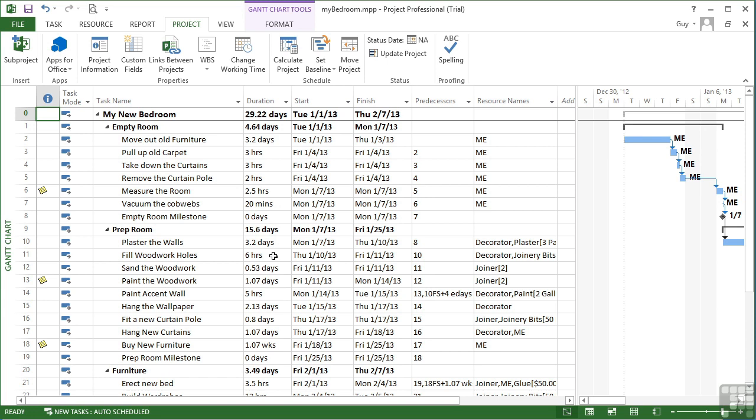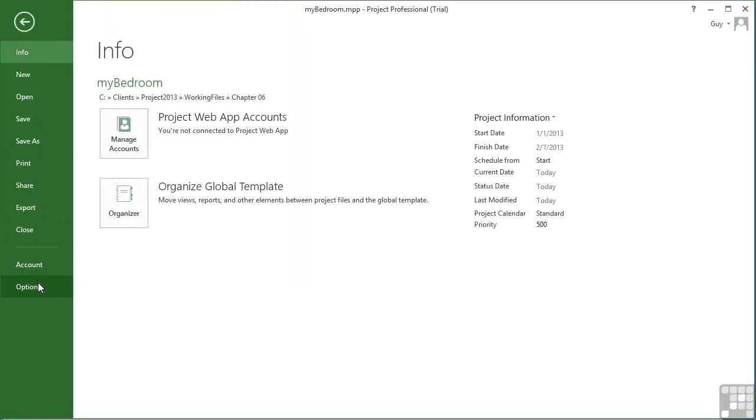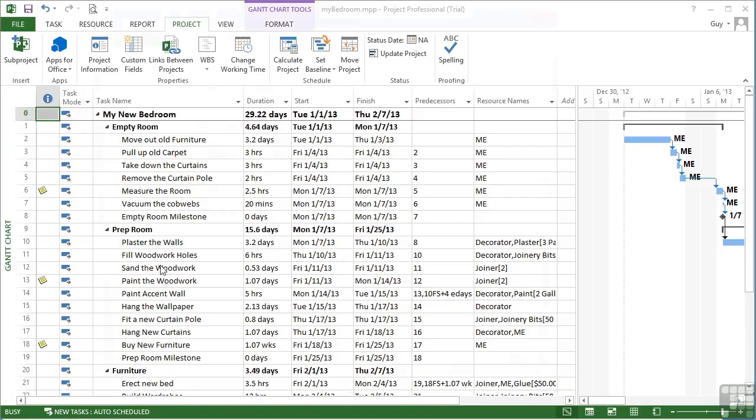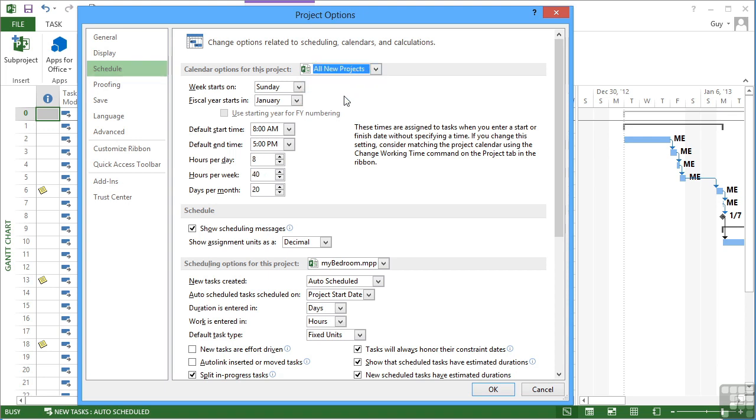At the start, before you start entering any tasks, any durations, and certainly any resources and assigning those resources. So that's done in a new project under File, Options, Schedule, and change these variables here. If it's a default you want to change for all projects from now on, then change this little drop-down to all new projects, make your changes, and then OK. And all new projects will then revert to your new default settings for the working week.